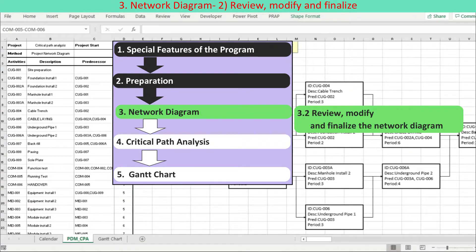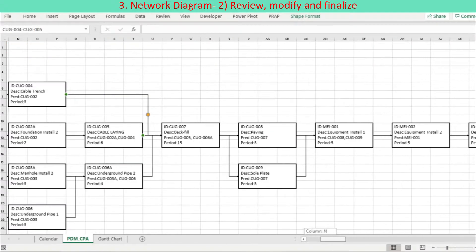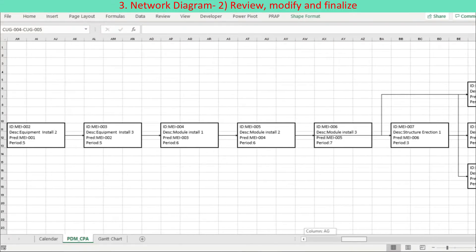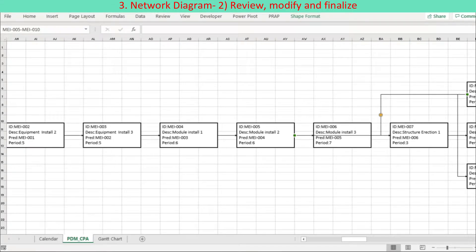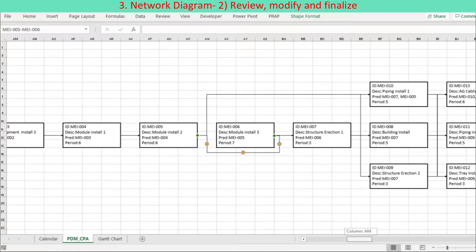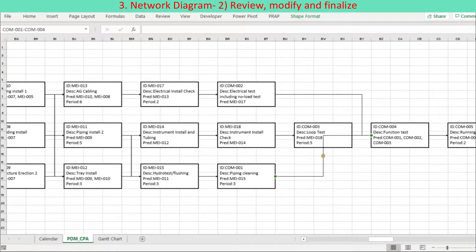You may move the activity box to your preferred position for clarity and connector optimization. Dependencies can be modified by changing the connected shapes for the connector, either predecessor or successor. The connected side is altered if you want to modify the default FS logic to another such as SS, start to start, using a 2-to-2 connection. Change the connector joint adjustment other than 50% to avoid overlapping of connectors. The network diagram for critical path analysis will be generated at the same position for activity boxes and connectors you confirm through this process.